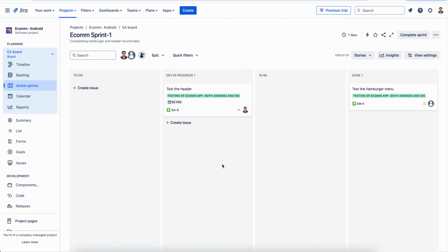When I create a due date in any user story while planning the sprint, it will help me in the long run. In the daily sprint meeting, I will open this sprint board and easily see that the due date for this user story was 6th Feb. Today is already 6th Feb, or today is 7th Feb, or today is 5th Feb. Why is it not completed yet? We can have a healthy discussion on the same. So this due date helps in keeping track of all the stories, bugs, tasks, any other thing from anyone.